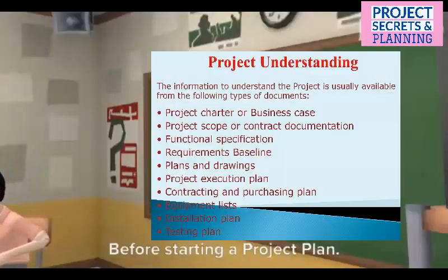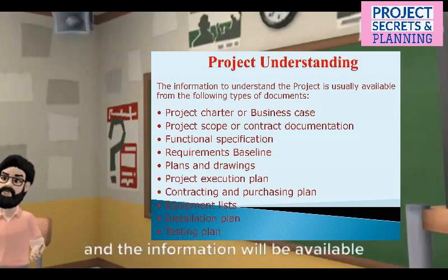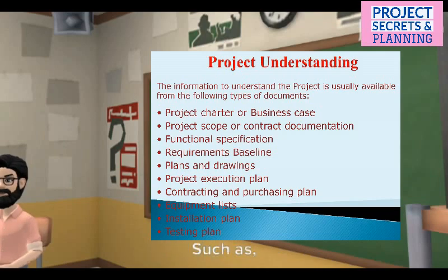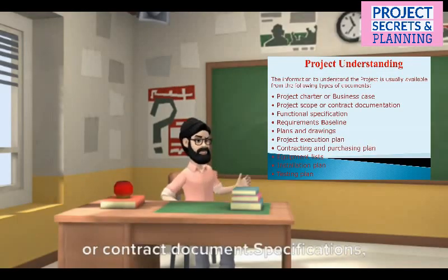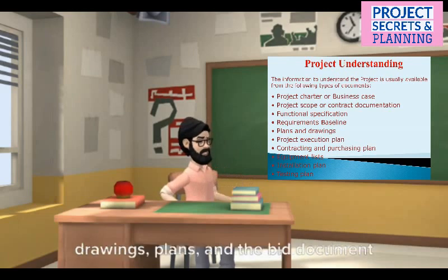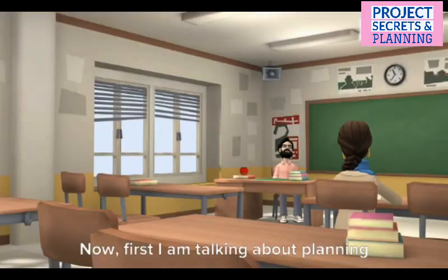Thank you, sir. Before starting a project plan, you should understand the project, and the information will be available in the following documents, such as your project charter, scope of work, or contract document, specifications, drawings, plans, and the bid document emphasizing what you promised your client. Now, first I am talking about planning without resources.